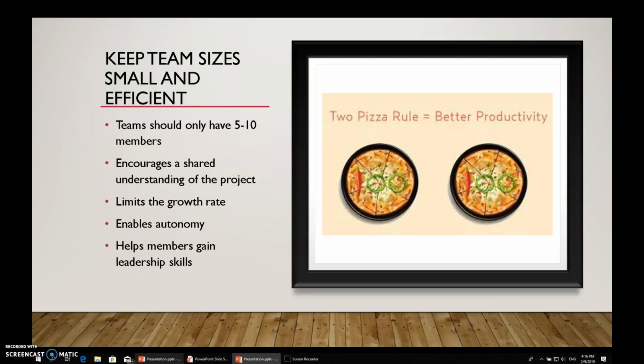Keep team sizes small and efficient. There are times when only one project is on the table and we have all 20 people available. We, however, never throw all our eggs in one basket, for other projects still need fine-tuning and support. We still assign the typical team and may add one more developer, and the rest are assigned to staff training and certification if not needed, or support. At all times, the teams must be growing in skill, testing and improving, while still developing at a fast pace. This is called the two-pizza team, which is basically just enough team members to eat two pizzas.